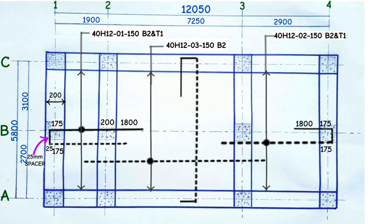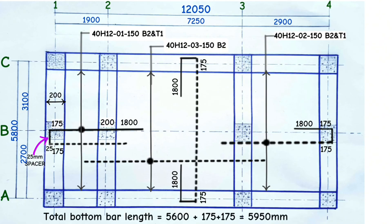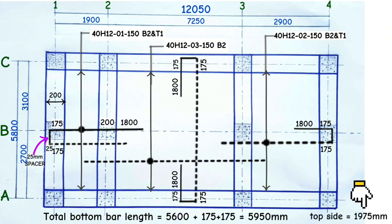The fourth steel bar shape has a thick top side and a dotted bottom side. The internal surface distance is 5.6 meters. Add 175 millimeters on one side and 175 millimeters on the other side to get a total of 5 meters 950 millimeters for the bottom bar. The top side is 175 millimeters plus 1.8 meters, giving 1 meter 975 millimeters, which we take as 2 meters. Other steel bar shapes can similarly be extracted from the main structural drawing to the bar bending schedule table.